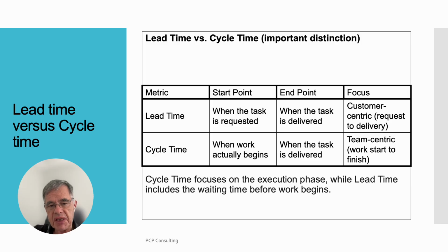Cycle time focuses on the execution phase, while lead time includes the waiting time before work begins.